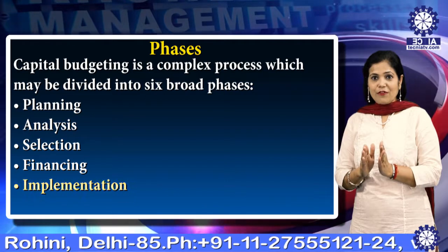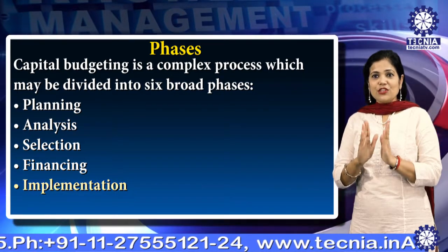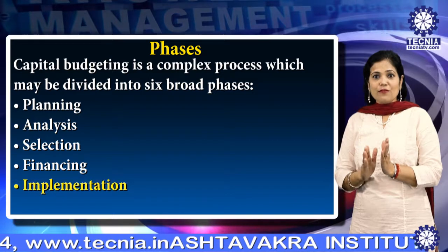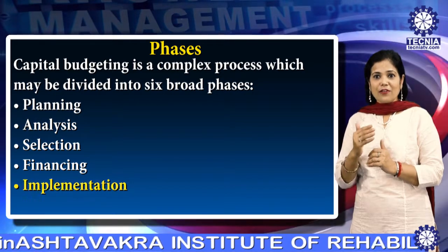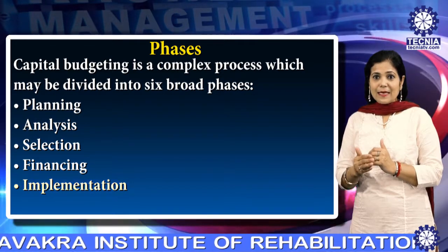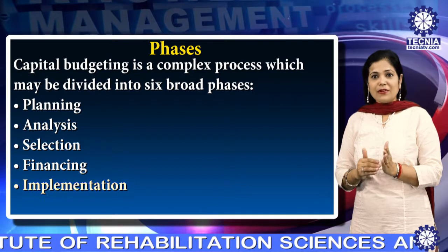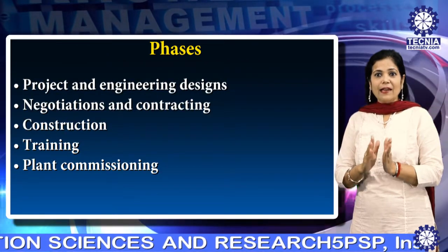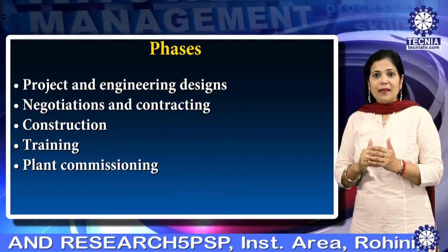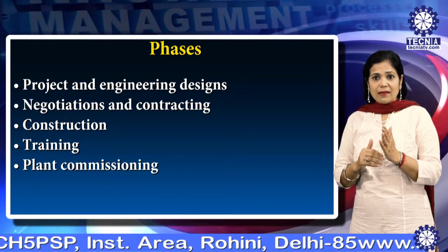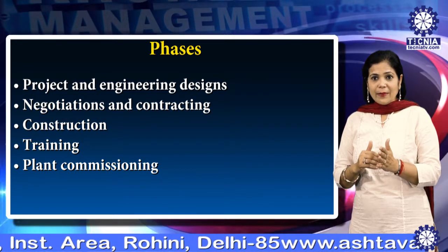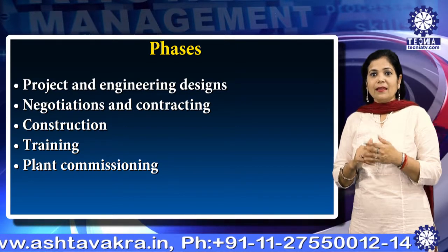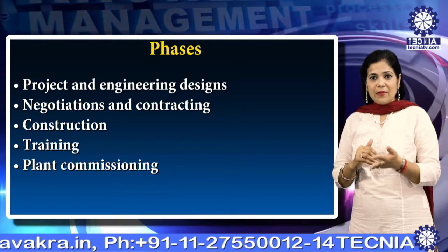Then implementation of a project. The implementation phase for an industrial project, which involves the setting up of manufacturing facilities, consists of several stages: project and engineering designs, negotiation and contracting, construction, training, and plant commissioning.